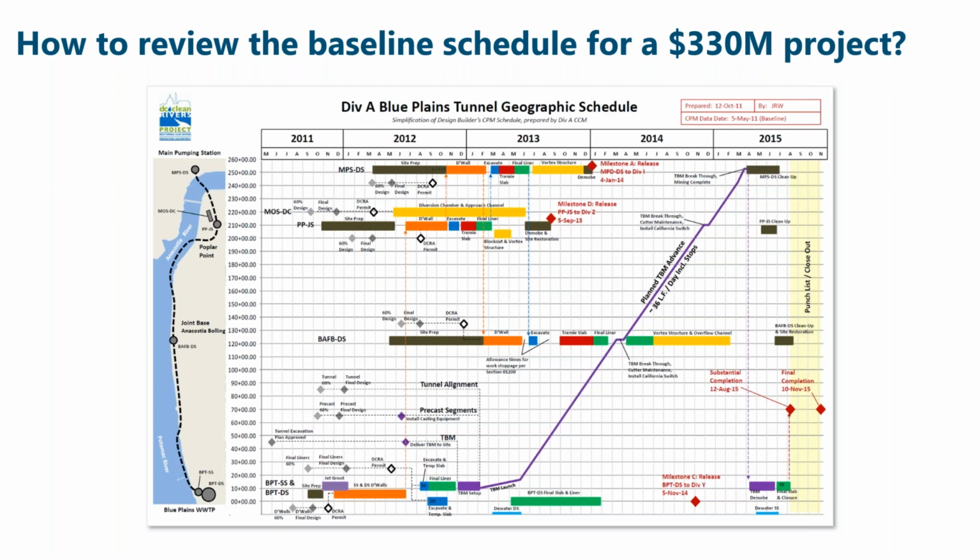You can see that the base in the middle, this BAFD, doesn't need to start in 2011. You can figure out when it will start, depending on when the TBM excavator will be in that station 120. Exactly, yes. And we also plotted the milestones on this chart so that people can see when our deadlines were, because we had other contractors after us that had to follow on with more work. So we had to turn over these sites at each of these milestones.